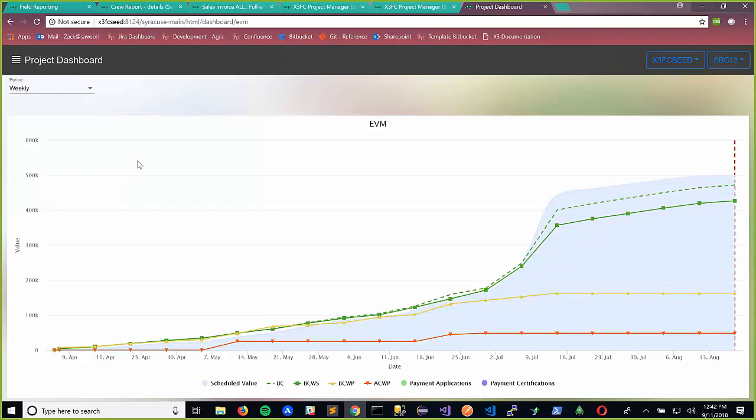And then we also added the budgeted cost line. The purpose there being, as I'm scheduling work, I can see how close I am to the top-down budget as I'm building up from the bottom up that budgeted cost of work schedule. So in the case on the left-hand side, those lines match up pretty good. Those times were in the past, so good there.